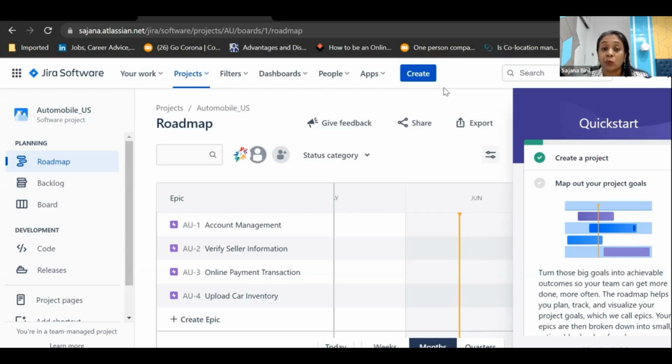Okay. So looking at this Epic, I come to the conclusion as a BA, I can't break it into user stories because I can't understand what she has written. It's very high level. So my next logical step is to have a requirement gathering meeting with her to understand this Epic. In the meeting agenda, I will indicate the scope of our discussion is account management Epic. And these are the questions that I have for this particular meeting. I send across the meeting invite to the respective stakeholders whoever should be invited.